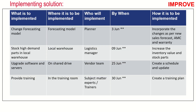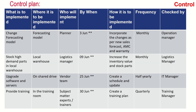All solutions were implemented using a 4W1H framework — what is to be implemented, where, who will implement it, by when, and how. A control plan was created in which implemented solutions are monitored by operations managers, logistics managers, IT managers, and training managers, checked on a defined frequency. By implementing all of these solutions, the team was able to improve their NPS score to 80% in the next three months — which was a great achievement.